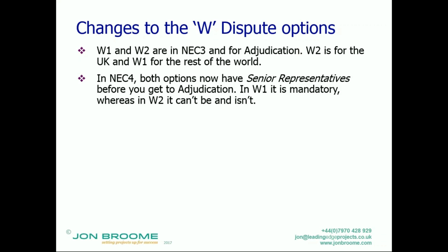So basically, if the site team is getting stuck, it can be referred to senior representatives who are outside the day-to-day, possibly the week-to-week of the contract, and they try and sort out the dispute and resolve it. They can get more of the root cause. Is it because actually we're having management problems, etc., rather than if you go down the more legal route.